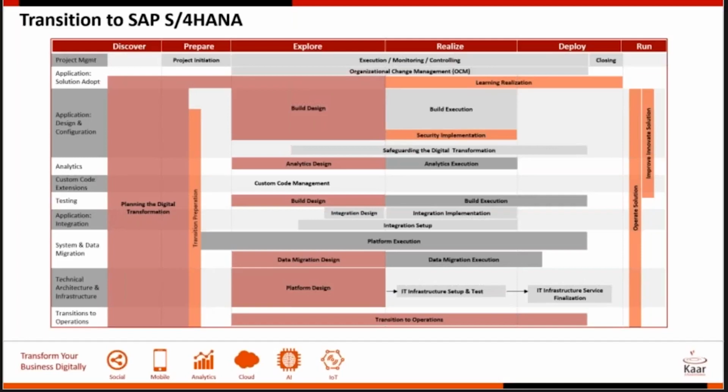With respect to testing, this covers the identification of the test cases, the test scenarios, the planning, and the execution as well. So the tests could include smoke tests, integration tests, regression tests, user acceptance tests, and performance tests. If you look at it, each of these tests is run by a different set of people, and the exit criteria for each of these would be very different. But all these will have to be plugged in at the right time in the project after each system conversion, so that we can progress to the final conversion of the production system with a lot more confidence.